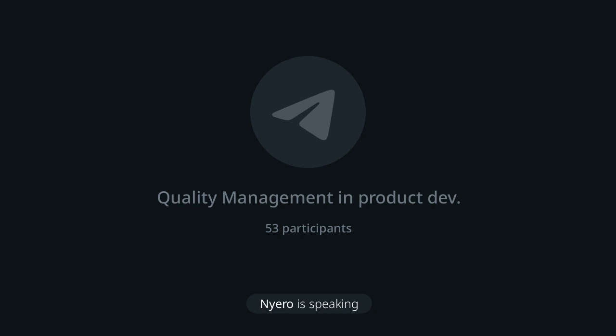So you conduct user risk assessment. If the issue is an engineering issue, maybe a functionality issue, you collaborate with your developer and say, hey, we want to launch it, but this thing is not working. What do you think? Do you think we can launch and then fix it when the product is already live? Because you want to meet your launch date. So you conduct risk assessment, sync with your relevant stakeholders, and see if it's possible. And if it's possible, you can go ahead and launch. But just bear in mind that if you are doing that, like I said, you take the responsibility.